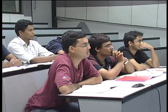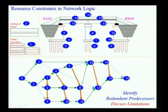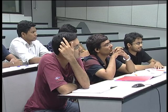Right, the blue arrows become redundant. So what do we mean by redundant? For example, we are saying here that we know that piles have to be cast for 6 to be done, we know that once 3 is done. So actually I am having the influence of 1 through both, through 3 and 1 directly. Is there anything analytically wrong with this? If I do a forward pass based on this, is there anything analytically wrong with having redundancy?